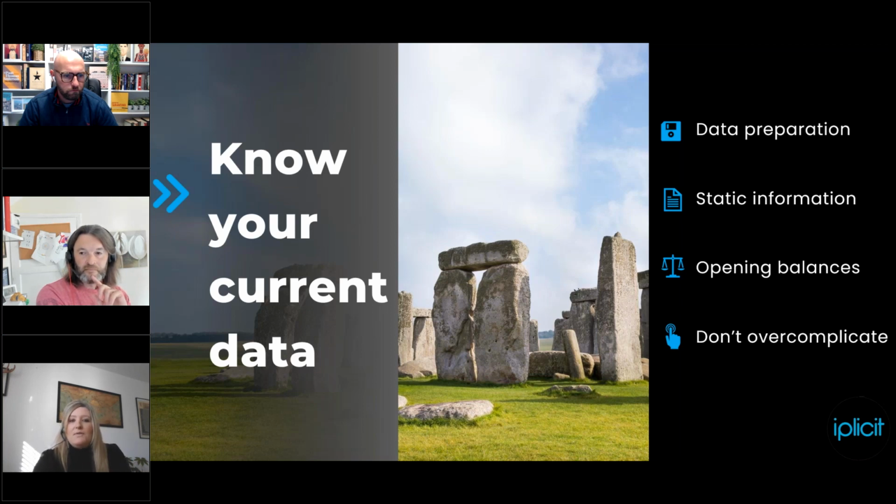everything is ready, or if it needs to be mapped, it's done so earlier on in the project, so there are no surprises. And the same thing goes for your customers and supplier records. Okay, you might have customers and suppliers you've been using for 10 years. Do you need those in the new system? So depending on the different scenario and the different industry, you'll have a cut-off and say, okay, well, I might not want those customers from 2021. Anything from then on, I'm moving over.